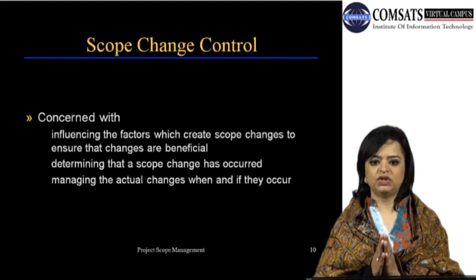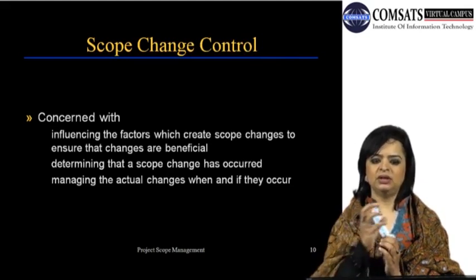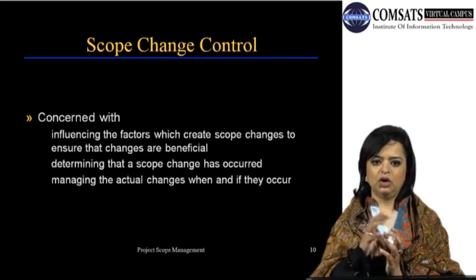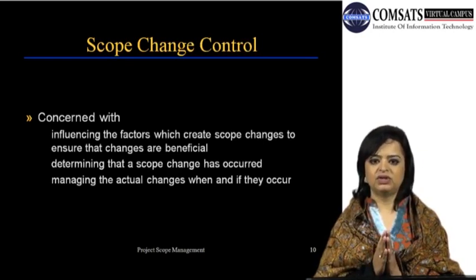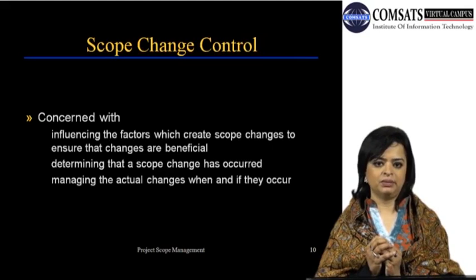So until scope verification, you have that leverage of changing, updating, modifying scope, all in agreement between you as a team, your project team, the project organization, and the project customers. All are in agreement, project verification is done, a formal milestone is achieved, and you baseline the project. Baselining the project would be considered a major milestone in the project life cycle, and that is done in the planning phase.